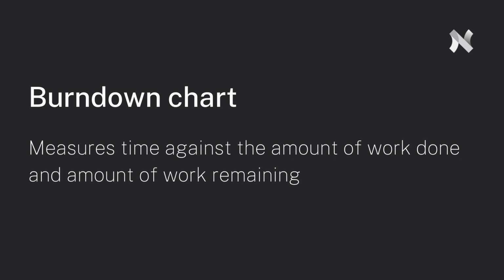I'll discuss how to manage your product backlog, which contains all the features, requirements, and the activities associated with deliverables to achieve the goal of the project. The goal of using a burndown chart is to keep the team aware of how they are doing against their overall goal. In a Scrum team, burndown charts reflect how the team is doing with completing user stories during the sprint. The Scrum Master will review the burndown chart, sometimes daily, to examine if the team will hit their goals or not.